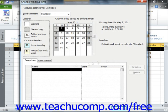You can use this dialog box to make individual adjustments to the Base Work Schedule calendar that has been selected. You can enter time off, vacation days, and other time that the resource will not be available to work during normally scheduled work hours by entering these items into the Exceptions tab.